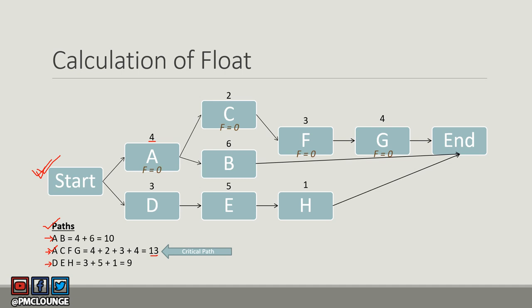Float for critical path activities is always zero. Activities A, C, F, and G have a float of zero because they are critical path activities and cannot be delayed at all.